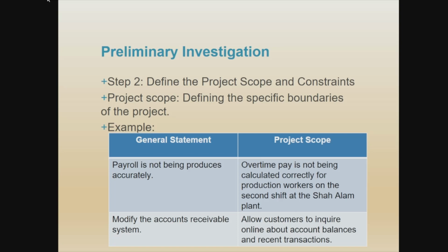Another example: modify the account receivable system. In general, what kind of account, who uses the account, for example. So the project scope is to allow customers to inquire online about account balance and recent transactions.